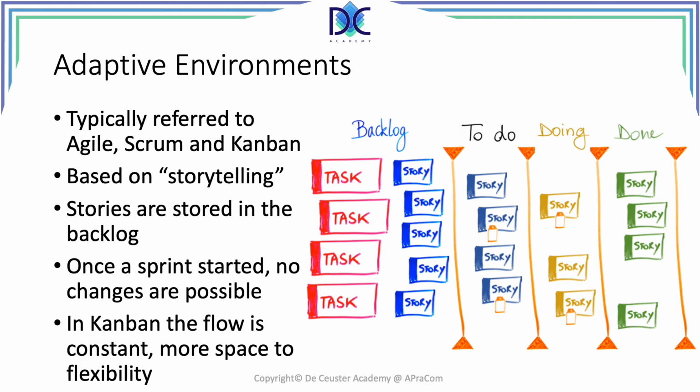At the basis, we have the product description and product backlog. The product backlog contains all the work that has to be finished to complete the project. The Scrum Master, together with the product owner, will decide the priority of the items to be completed and plan them in sprints. The items in the product backlog are referred to as stories and describe the work that has to be completed with an estimation of the effort.